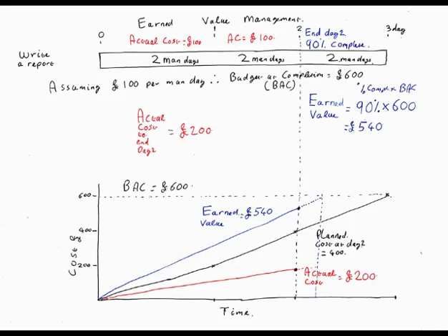Another disadvantage is that once you start measuring things, people manipulate the measures to suit. One of the organisations I worked with paid their project managers a bonus when they had a one. If their cost performance and schedule performance equaled 1 at the end of the year, they got their bonus, plus or minus 0.5%. It's surprising how many had one. So they all had one. And then in January it was all rubbish again. They were very good actually. Every month they just did a change request to re-baseline the plan. If you're going to pay people, people will find a way.